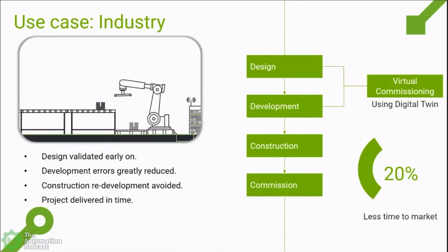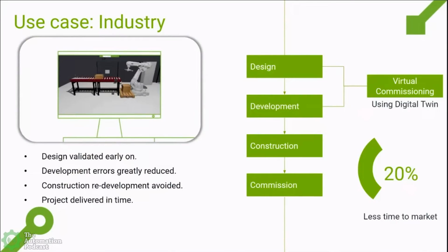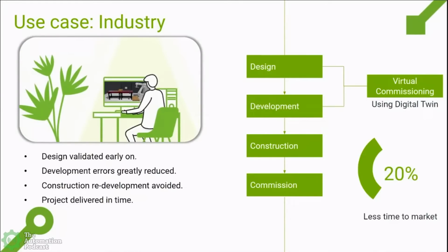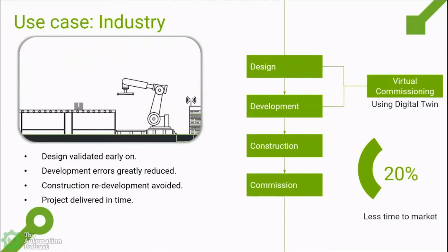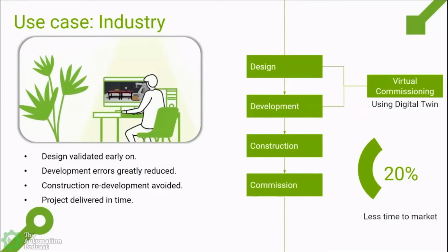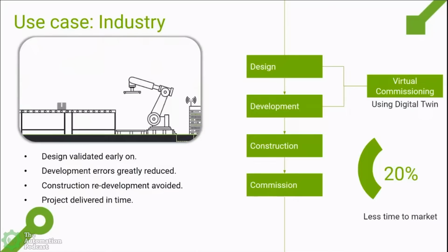So traditionally, virtual commissioning has been something to replace somehow the commissioning part or reduce the commissioning part, but we see a transition where virtual commissioning models or emulation models like the ones that you can build with Simumatik can be used almost from the very beginning of the process. So you can build a model almost in parallel with the design of the system.